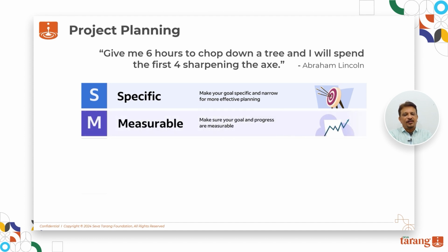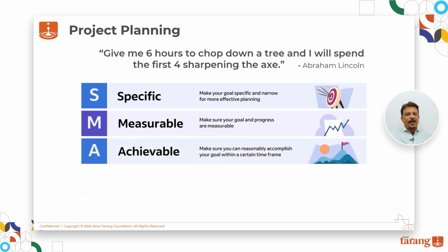Measurable: creating criteria that you can use to measure the success of the goal both quantitatively and qualitatively. For 500 grade 5-6 students, by 20% is a quantitative measure, while improving reading proficiency and continuing to higher education is a qualitative measure. Attainable or achievable: identifying the most important goals and what it will take to achieve them. A singular objective of increasing reading proficiency amongst only 500 students of grade 5-6 in 3 months makes the goal attainable, as almost every parameter is fixed to make it achievable.